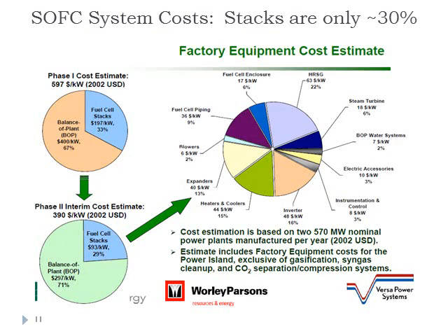And so FuelCell Energy also publishes results looking not only at the stacks but also the balance of plant equipment. Some of this balance of plant equipment are the fuel cell enclosures, fuel cell piping, blowers, expanders, heaters and coolers, the inverter, and that AC-DC inverter actually is one of the major balance of plant items. Right, this is the inverter that goes from DC to AC. You have some other instruments of control, water, perhaps steam and steam turbines or a heat recovery steam generator. And those balance of plant costs are actually significant compared to the stack costs.